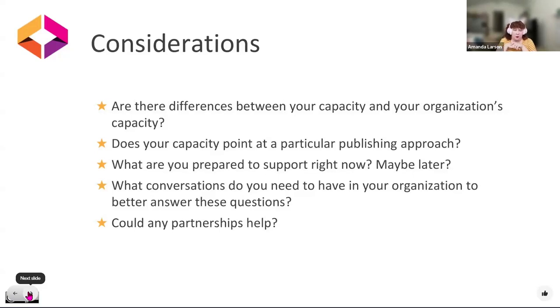I do some one-on-one publishing projects that are within a do-it-yourself model. But a lot of that's very high level and strategic thinking on my part, and then some production work. For example, we have a textbook called Choosing and Using Sources, and there's one author and there's one me, and I set the parameters that we're going to start versioning this so it's not big, huge overhauls at one time, just to be respectful of both of our time and energy. Now we have implemented a versioning schedule and that seems to be working really nicely for us.